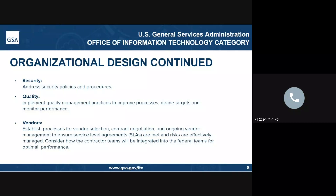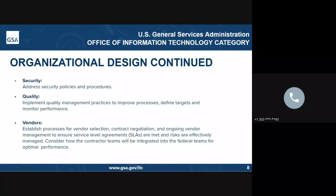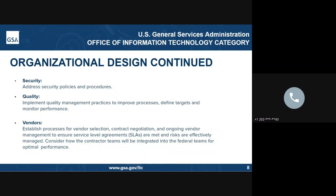Quality management practices are also going to need to be updated and improved, because the defined targets and the performance monitoring that you had within your on-prem or current environment will change greatly in the new cloud environment. Vendor source selection and communication is key. Contract negotiation with vendors and post-transition SLA management are a major part of any transition. The risks with any vendor changeover is often where project delays and key data gaps happen. This occurs because you're generally moving from one type of service to another — many vendors or vendor service types that you're buying and using on-prem won't be the same ones you'll use when you move to the cloud. Always remember, cloud-based infrastructure works differently than your on-premise environment, and having a good process for both vendor selection and the management of those vendors is key to avoiding downtime and cost overages.